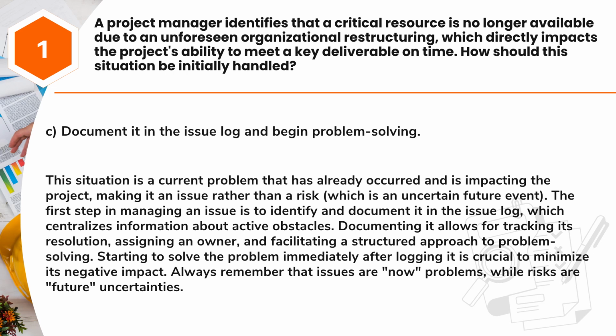Answer: C. Document it in the issue log and begin problem solving. This situation is a current problem that has already occurred and is impacting the project, making it an issue rather than a risk, which is an uncertain future event.